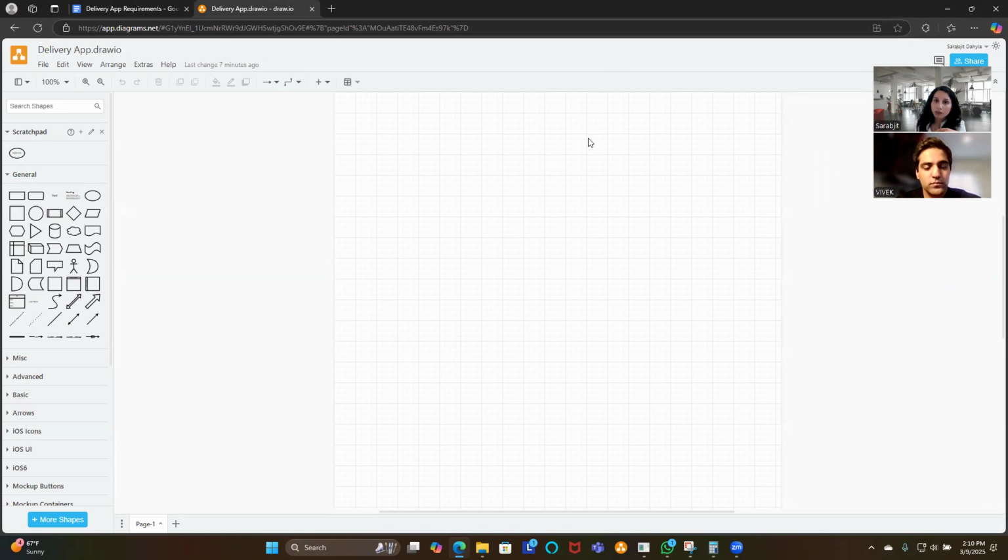And I also know that a lot of projects that we work on will not have a project charter. So if there is no project charter, work with your PM to help you understand the high level scope of the project, because if you don't have that high level scope identified, it may become really difficult for you to work on requirements because then the universe is wide open, right? If there is no project charter, you may be asked to create one, and that's normal too. So again, you start with a project charter.